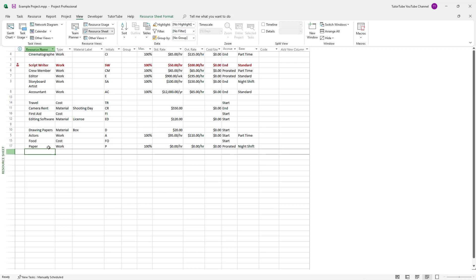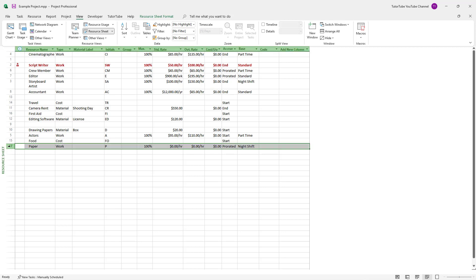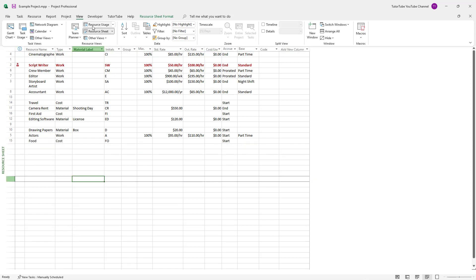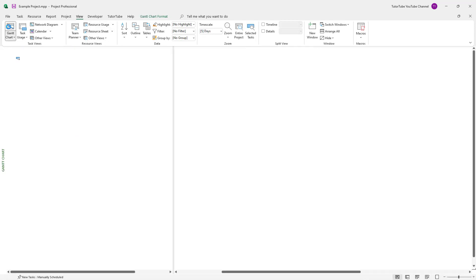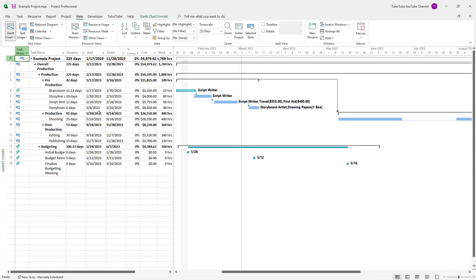And as I typed in paper, you can see that it automatically created a new resource. But that is something I don't want to happen. So let me just delete this out right here, delete the resource, and let me just go back to Gantt chart.